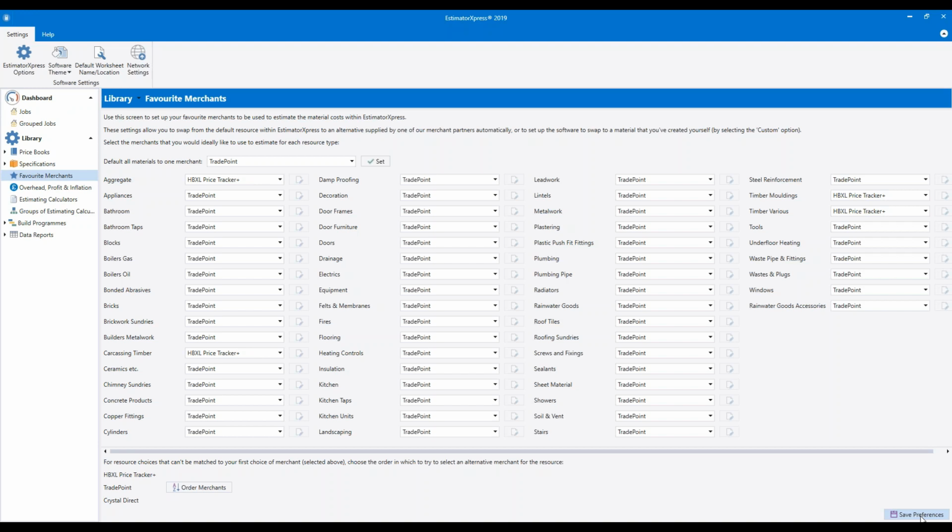Okay, so just a quick summary of what we've done. In the price book, there are 5 different sections: material, labour, plant, subcontract and sundry. It's really worthwhile spending a few hours tweaking your price book so that it has the correct costs, and then you've got a really good set of base data for your estimates. Once you've set up those costs and once you've set up your prices and saved them as an adjustment, then the material prices will track market changes.